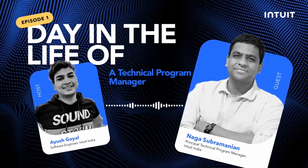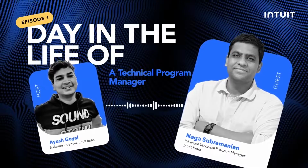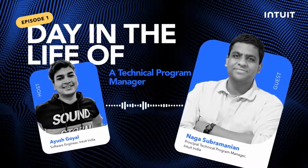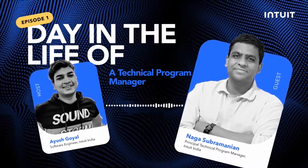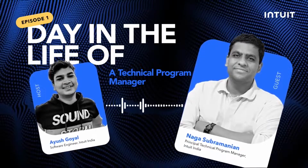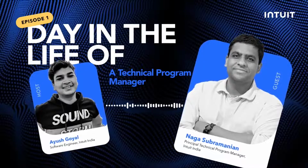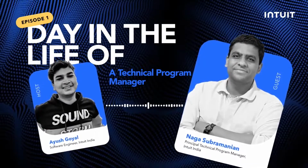They say, yeah, possible, not possible, some sort of conversation happens. If they say possible, fine, I'll come back and remind you. If they say not possible, discussing it now gives you more runway to solve the problem before October. You don't want to start that conversation on September 30th and then get into immediate red flag mode. So that is maintaining relationship, respecting their time and giving them enough time.